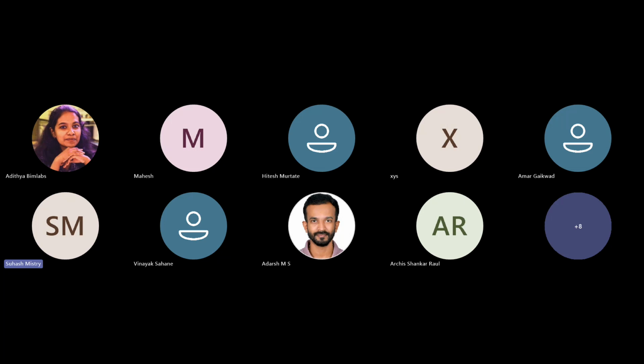It is possible. We can get the actual quantity we require, as per the diagram of what we are placing at site. We can create the families as per what we are placing at the site. Then we can use those formulas in Revit and develop. It should be strong in family creation. Then they can place the exact model that we use in the field, and then we can take the quantity takeoff. Okay.